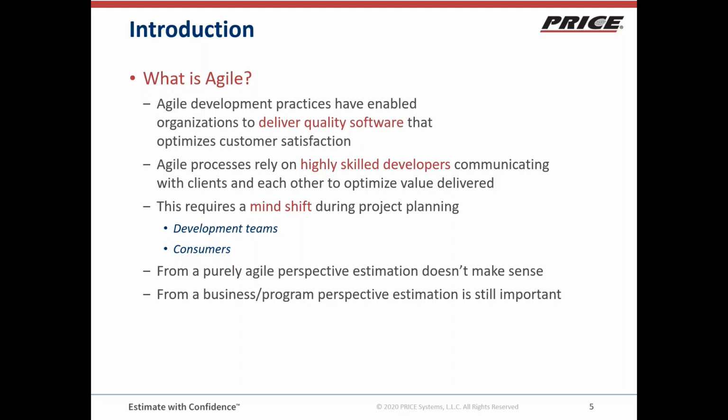They're employing Agile processes and best practices to help improve the satisfaction of their customers and potentially to help improve the team's performance. But they're not purely Agile. If they're purely Agile, then you know when the release is going to be, you know how many iterations you're going to do. You know that when you get to that release date, the product is going to be released. You don't know necessarily what's in it, but doing an estimate on a project like that is really just math.